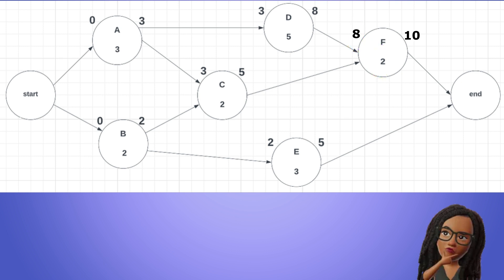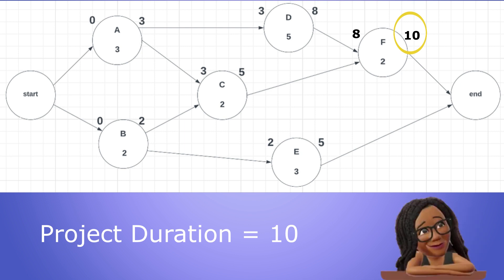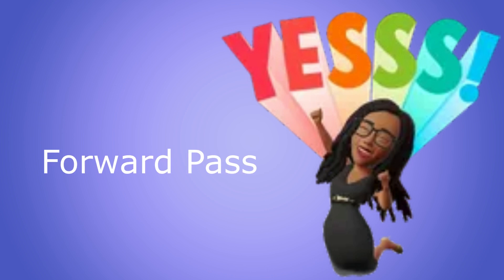Since there are no more activities, the project duration is set at the early finish of the final activity, in this case 10 days. This is the project length that will be included in our project plan and used to manage our project schedule. And there you have it, our forward pass is complete.